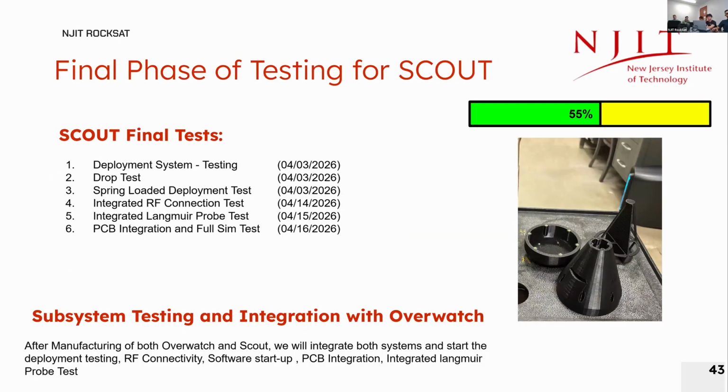The final phase of testing for Scout. Between April 3rd and April 16th, we will be conducting deployment system testing, drop test, spring-loaded deployment test, integrated RF connection test, integrated Langmuir probe test, and PCB integration and full mission simulation test.